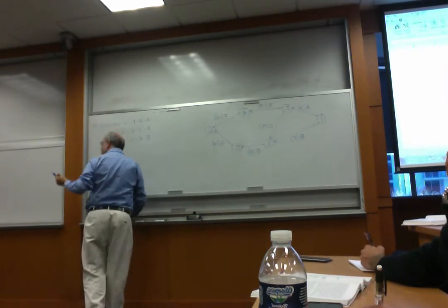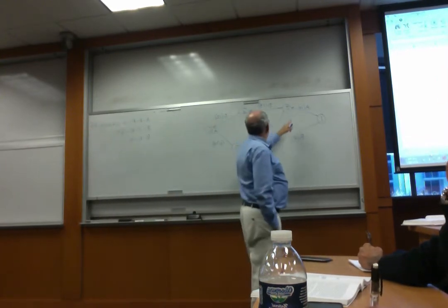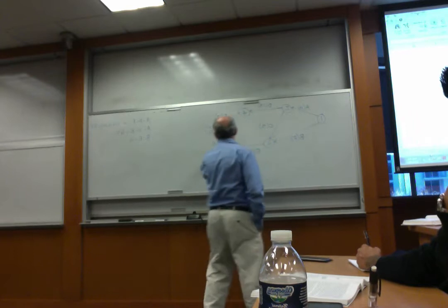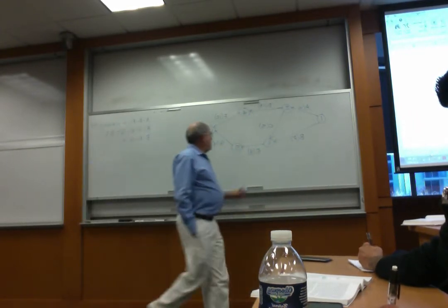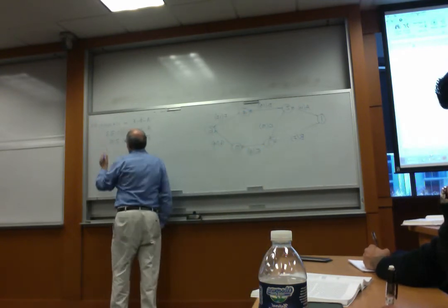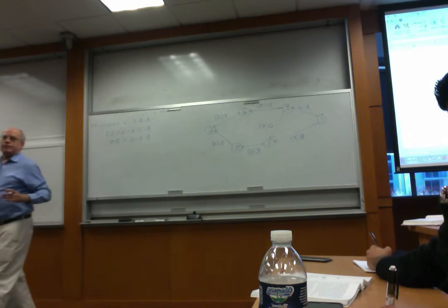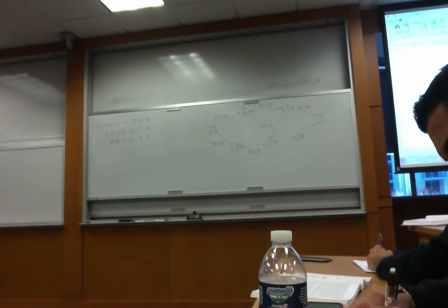35. This we did last week, but just one continuity. Let me just do this part. A, C, E, G, 10, 15, 19, 33. B, E, G, 11, 25. Okay, and last week I told you, if we were solving a shortest path problem, what is the shortest path from 1 to 6? The answer, of course, is 25.